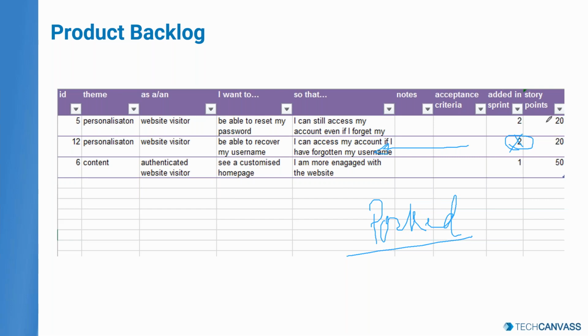Okay. There are also estimates which are mentioned in the backlog document. So another point of change in the backlog document is before the iteration starts, there is a meeting of the sprint team members. That is called the sprint planning meeting, where you sit together to agree on the estimates and the complexity of each of the items to be taken up during this sprint.